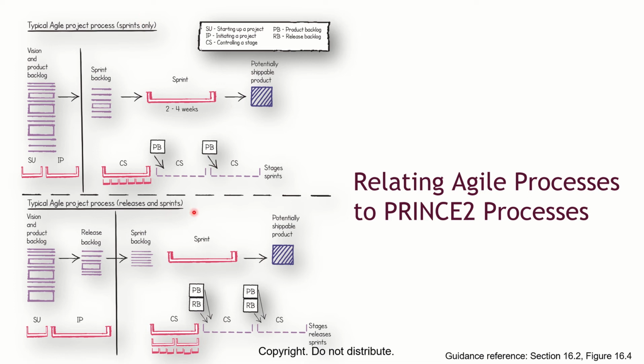That is when you compare releases and sprints or sprints only. Another way to look at the difference between these two is when you say sprints only, it's like we have finished the ground floor, tick. Then you start the first floor. Then release is we have finished the ground floor in terms of the carcass. Release is to do more than the carcass. Plaster the inside and the outside of the ground floor, or plaster the inside alone. Okay, put some fittings there so that it could be used for a warehouse or whatever purpose. That is like release as you do your sprints.